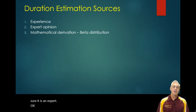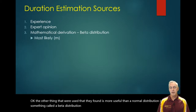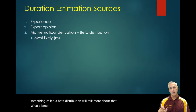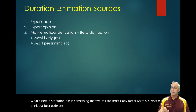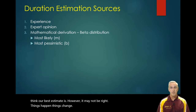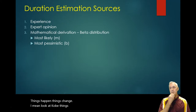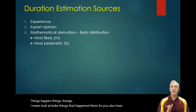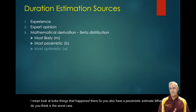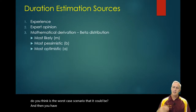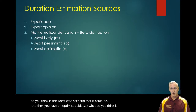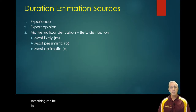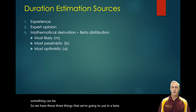The other thing that's been found to be more useful than a normal distribution is something called a beta distribution. A beta distribution has what we call the most likely factor — this is what we think our best estimate is. However, it may not be right. Things happen, things change. So you also have a pessimistic estimate — what's the worst case scenario? And then you have an optimistic side — what's the best case scenario? We have these three things that we use in a beta distribution, which is different than normal.